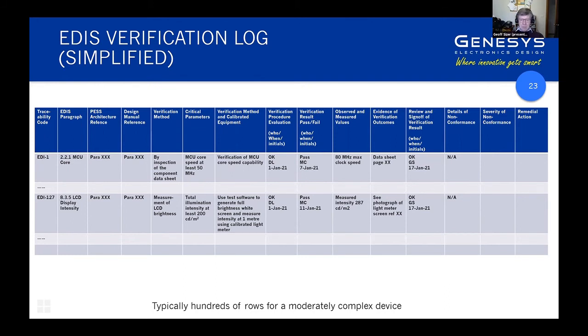And so, for example, if I'm doing a measurement with a light meter, I'll take a photograph of the light meter, or if it's a suitable capable device, do a capture of that evidence, so that if your auditor says, well, okay, you show that the engineer did this, how can you prove it? You actually have that evidence available to you.